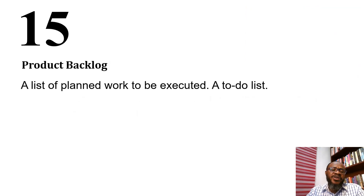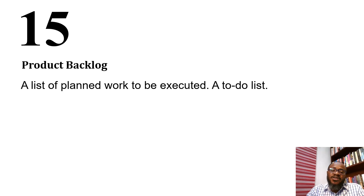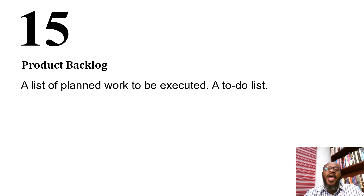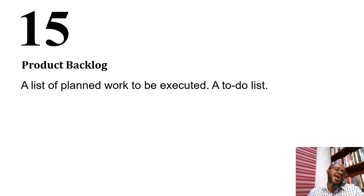The product backlog is essentially a list of planned work to be executed — more or less a to-do list. On electronic boards, the to-do column is your product backlog, containing all planned items that are constantly being prioritized by the product owner.